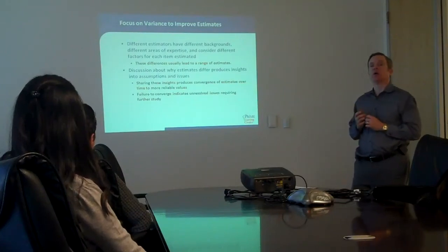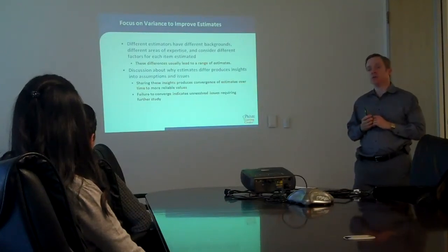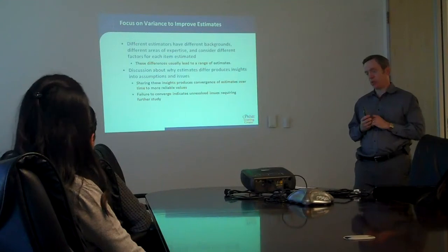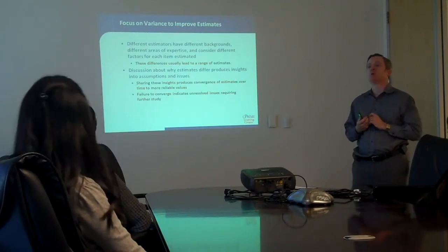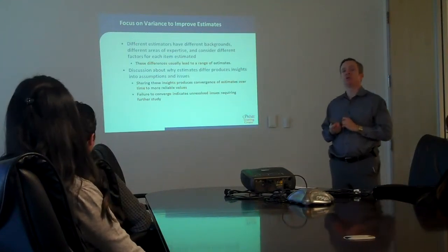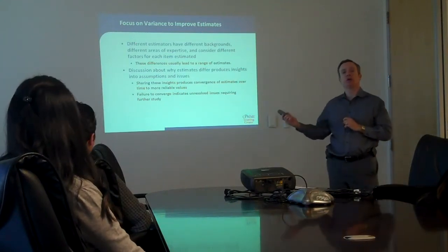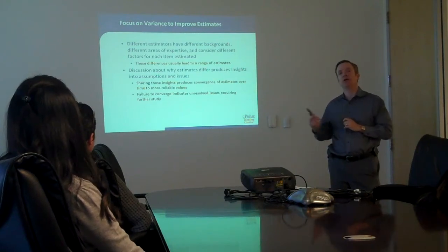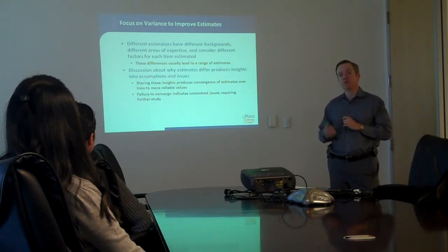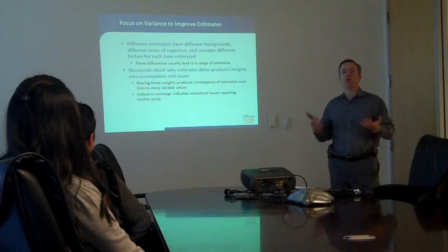We learn something about whether or not the process converges — that teaches us something as well. Suppose we ask the question once and get a range of values from 1 to 7. Ask it again, we get a range of values from 2 to 8. Ask it again, we get a range of values from 3 to 7. We're not convergent.